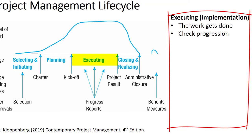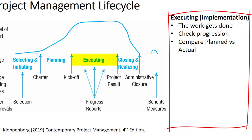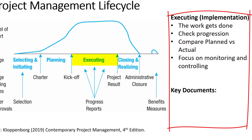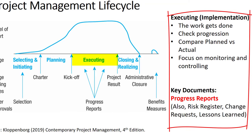Within execution, the project manager is checking planned versus actual work performed and providing progress reports to certain stakeholders such as a client. The process of monitoring and controlling performance is a major part of this phase. The key documents are progress reports. However, other documents are also used throughout this phase, such as maintaining the risk register, managing requested changes using a change request process, and capturing lessons learned during implementation.